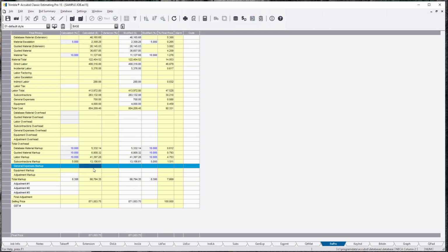Here's the thing with this: over time you're going to understand that you just can't go in at an 8% or a 5% or whatever the case may be. If you think strategically about how you can beat your other contractors, your competitors, you can strategically lower the percentage of markup on high ticket items.